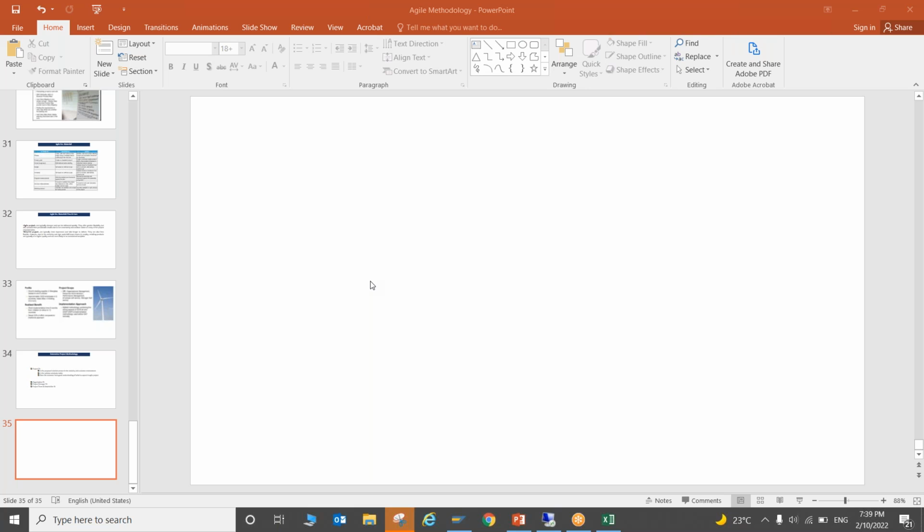That is the use. Okay, but in my system the PR is not generating. I gave the materials and everything, budget maybe and everything. You try to check if there is any gap. Otherwise you can check this procurement indicator. If it is a material, then you need to select the item category there. For inventory item it will be L, and for non-stock item it will be N. And keep the plant priority for project 1, then definitely it will work. You try to check that one. Sure, definitely I'll do it.